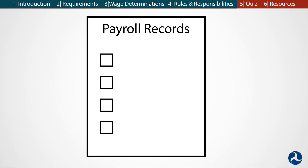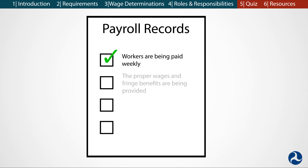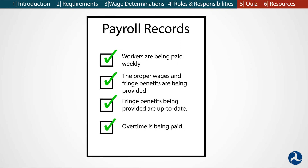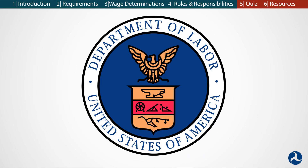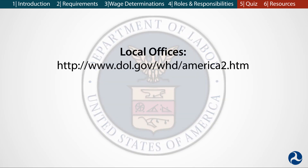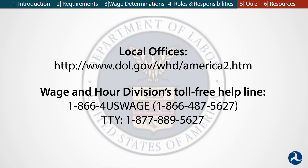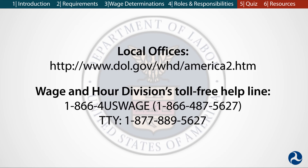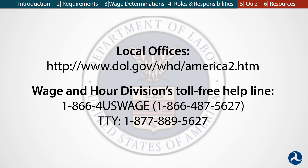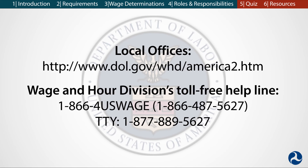FRA may request this information to verify DBA compliance. Payroll spot checks are reviews of payroll records for the laborers and mechanics working on a project. These spot checks should verify that workers are being paid weekly, that the proper wages and fringe benefits are being provided, that those fringe benefits are up to date, and that overtime is being paid. The results of the interviews, payroll spot checks, and any potential violations that are discovered should be documented. Speak with the FRA grant or loan manager to get information on how to document this information. Project sponsors should report potential violations to the FRA grant or loan manager or to the Department of Labor. Laborers and mechanics can report DBA violations either to their employer or to the Department of Labor's Wage and Hour Division. Project sponsors should check with their FRA grant or loan manager to determine how often the interviews and payroll spot checks should be conducted.